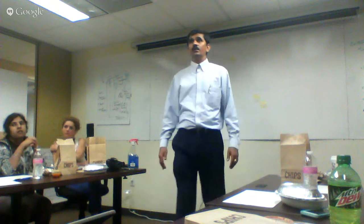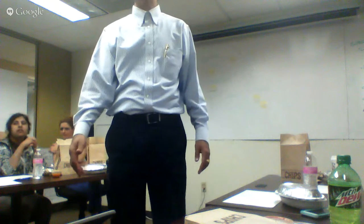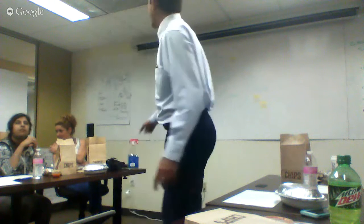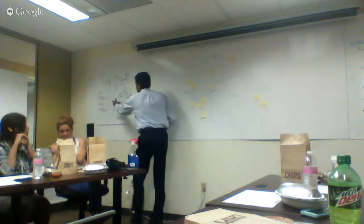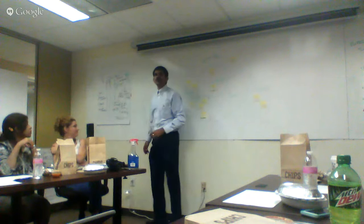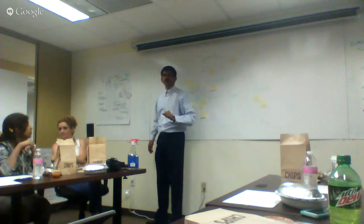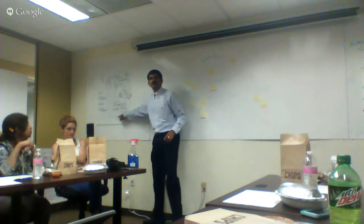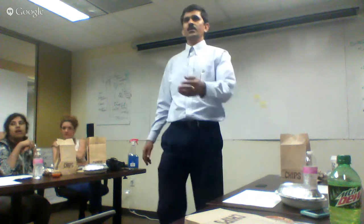But is there any activity or phase where you document lessons learned? Yes, for the client. It's here. In the sprint retrospective, you document the lessons learned for the process. Like for the product, this is for the team. That's where you record it.